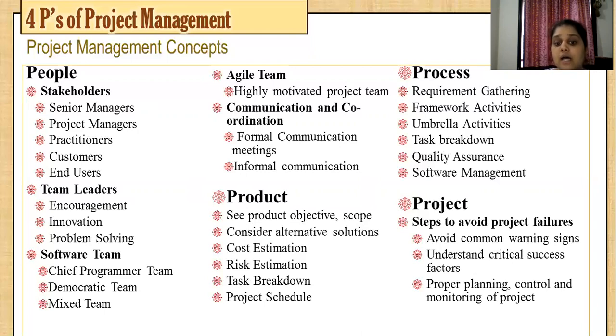Then you should know your task breakdown. Task breakdown is nothing but breaking your job down into subtasks. So if I have requirement elicitation, the subtasks can be talking to the customer, talking to the users, and talking with the people in your team to gather the requirements. You are also checking historical data. So these are the breakdowns of a single requirement elicitation phase. You should be able to break down your task into small modules.